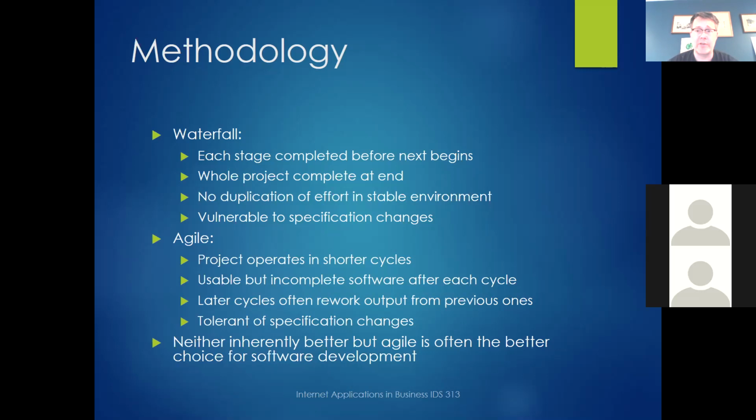And make sure that it works on the standard website that you're using. That would be fine. And then for the next round of the cycle, you do the same thing with the next feature. You add in some more features to your application, or you test it on a wider range of technology, stuff like that. So in Agile, your project works in shorter cycles. There is inevitably going to be some duplication of effort, but the issue is you won't be surprised.